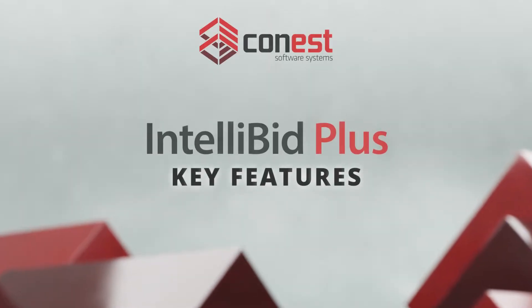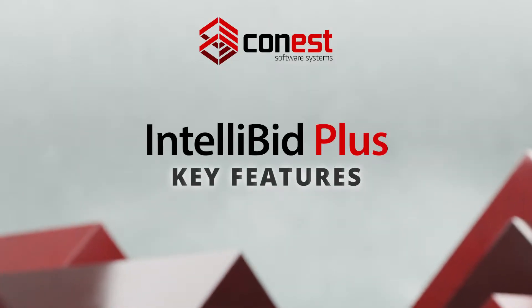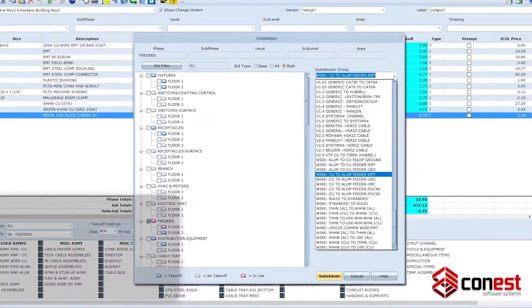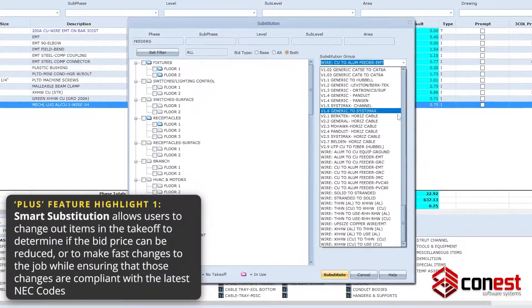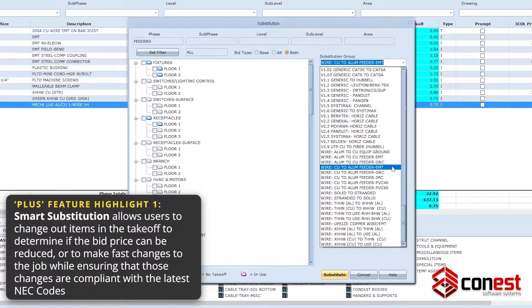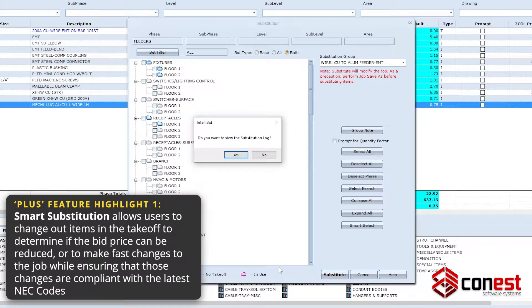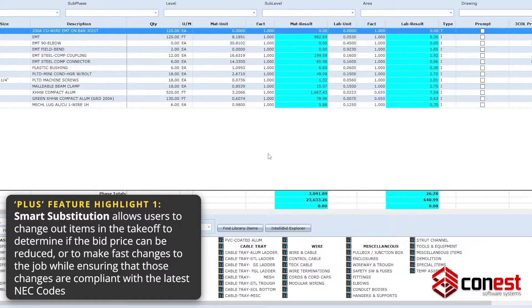Key features of IntelliBid Plus include Smart Substitution, which allows users to change out items in the takeoff to see if they can reduce the price of the bid while still having those changes be compliant with the latest NEC codes.